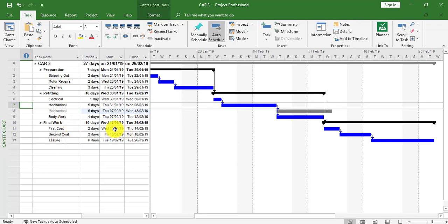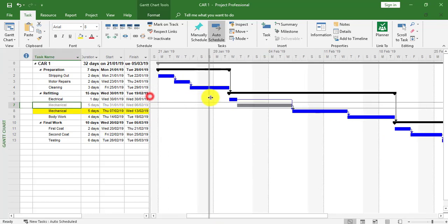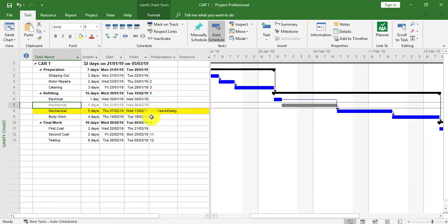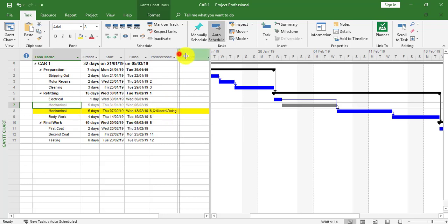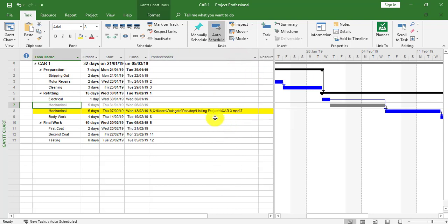We might want the link to change, so I'm going to go back to Car 1. If I look at the links, I can now see I've got an external link on Car 1 for the mechanical task, the yellow task. I can see the external path that's been created. It's linking to task 7 of the Car 3 project. Now I'm going to change this link to a Start to Start.